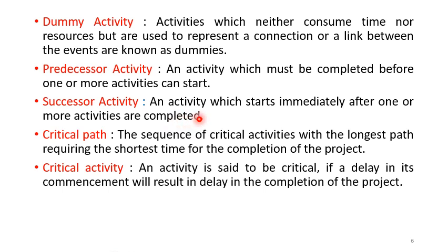But one thing has to be remembered: if a particular activity has two preceding activities, both the preceding activities have to be completed for that activity to start. The succeeding activity can only start if all the activities immediately preceding it are completed. Only then can that activity start.